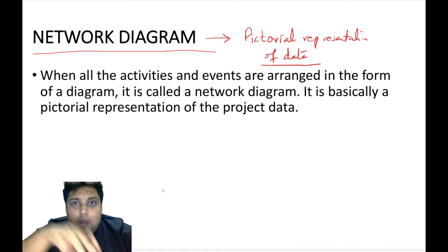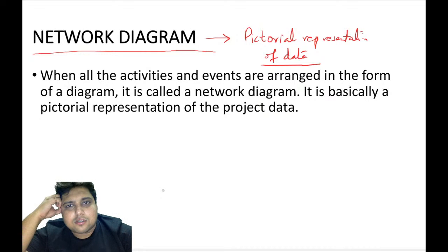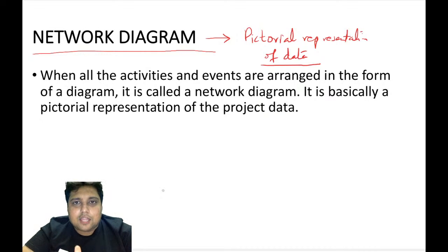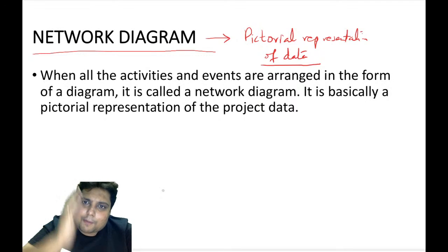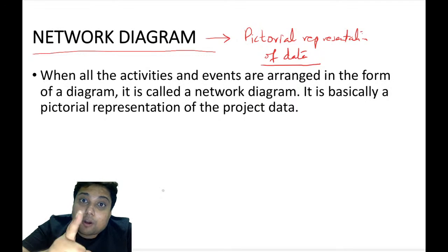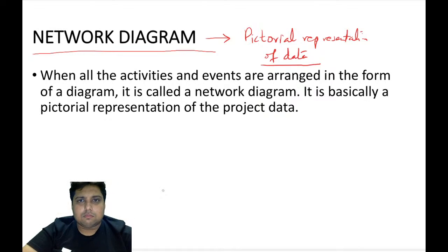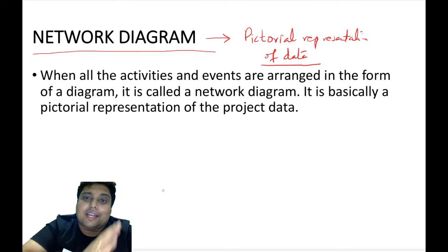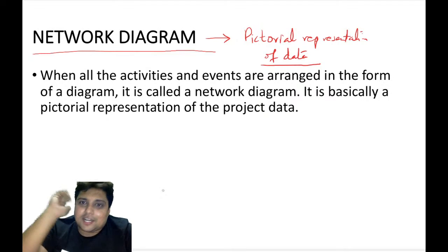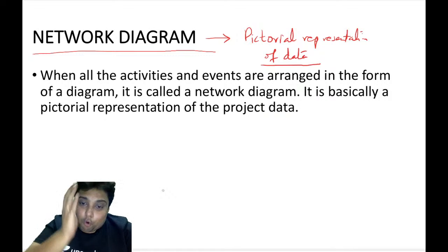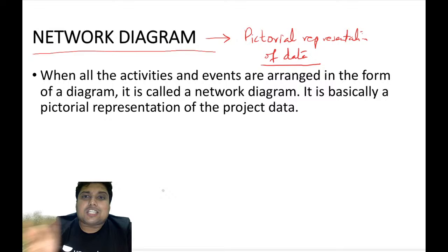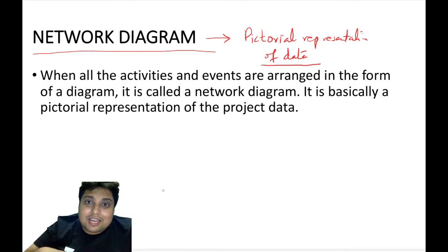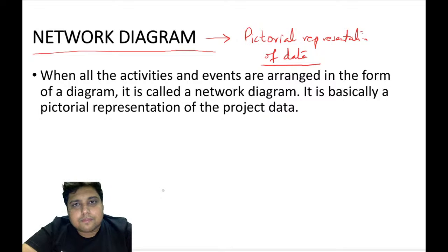So, as you know, a project is nothing but a group of activities and events. And these activities and events, they consume resources, they happen on a particular date or time, and the most important thing, they happen in a particular order. Certain activities are bound to happen before certain other activities. Before brickwork, you cannot put plaster on the walls, and before plaster, you cannot put paint on the walls. Remember this. So a project is nothing but a group of activities and events.